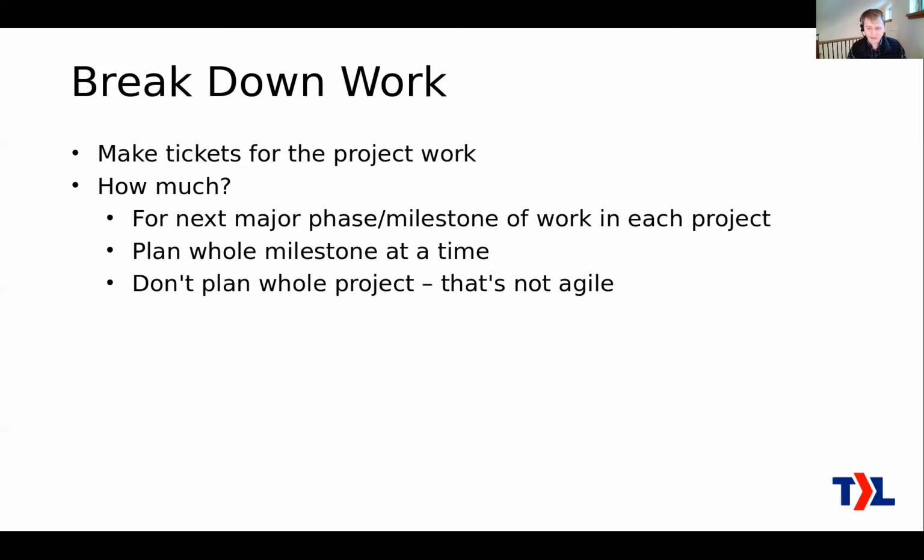So how much do you need to break down? Here's what I would say. It depends on the size of the project. If it's a small project, a single phase, go ahead and break it all down. If it's a big project though, first break it down into the key stages of that project, like the phases or the milestones that you're going to deliver to the customer, and just do the first stage.